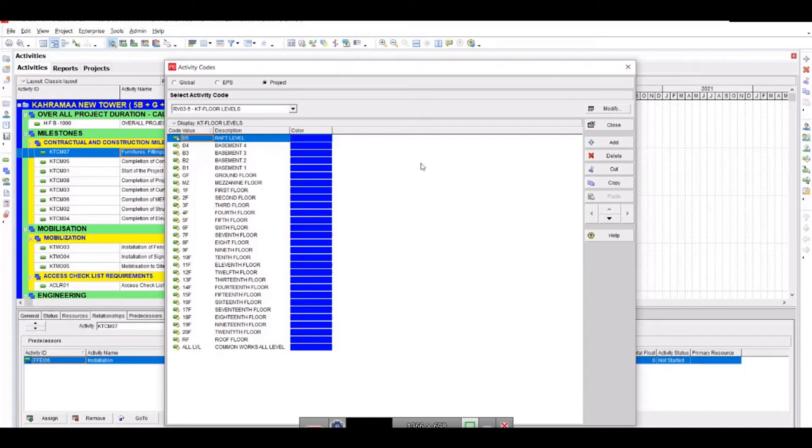If you want to integrate the floor of the building, let's say the wet areas, dry areas, passage and lobby, corridor, all the dry rooms and bedrooms, utilities, then you need to assign the plan of the drawing, not the elevation. In that case, you need to have all the activity codes for the plan. Let's say wet area, toilet, bathroom, and you can say a bedroom or a utility room, garbage room. These will be your activity codes. The best suited option for a high-rise building is the levels, the elevation, because you will be monitoring most of the things floor wise.